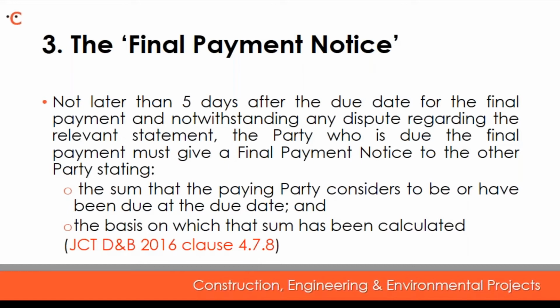Under clause 4.8, not later than 5 days after the due date for the final payment, and notwithstanding any dispute regarding the relevant statement, the party who is due the final payment must give a final payment notice to the other party stating the sum that the paying party considers to be or have been due at the due date, and also the basis on which that sum has been calculated.